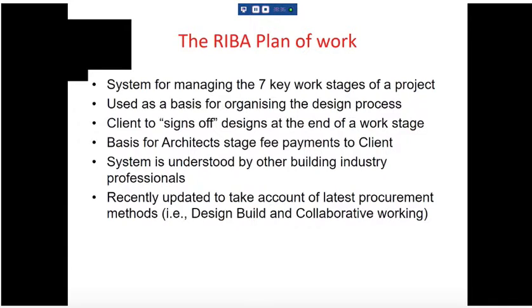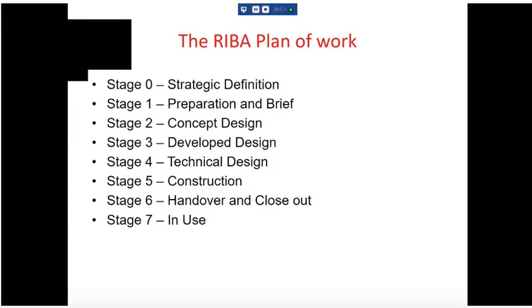If you're sensible, you have sign-off at the end of each stage, so you don't have that problem you have in reviews where people say, oh, I don't like this, and you say, well, last time I showed it, you loved it, etc. We also share it with the rest of the building industry, so contractors also are familiar with this system. And it recently got updated to take account of hybrid procurement systems, which we'll come on to.